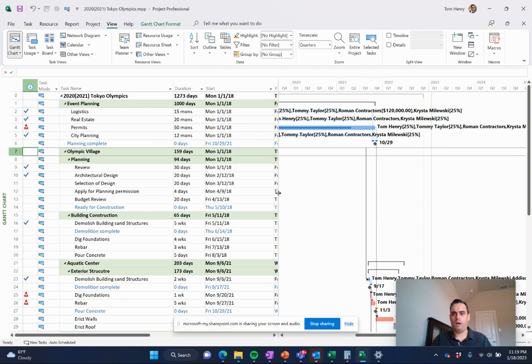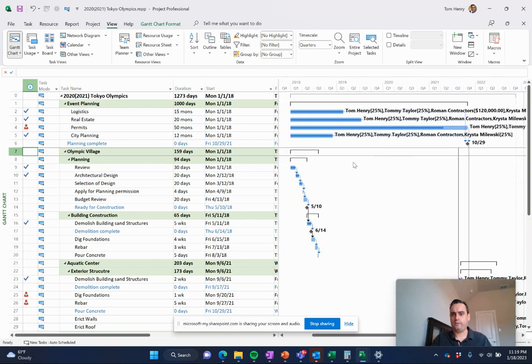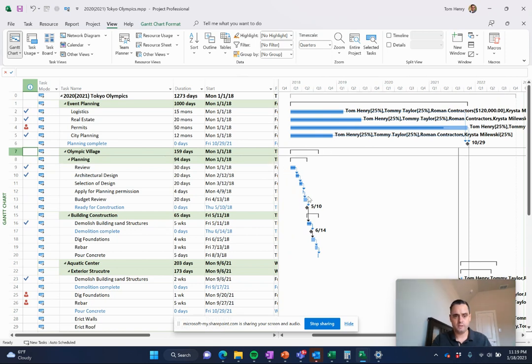On the Gantt chart, I can see the completion status of the tasks within my project as well. I can see this one's almost done. These ones are already complete. Some of these are complete. We're a bit behind on some of these.